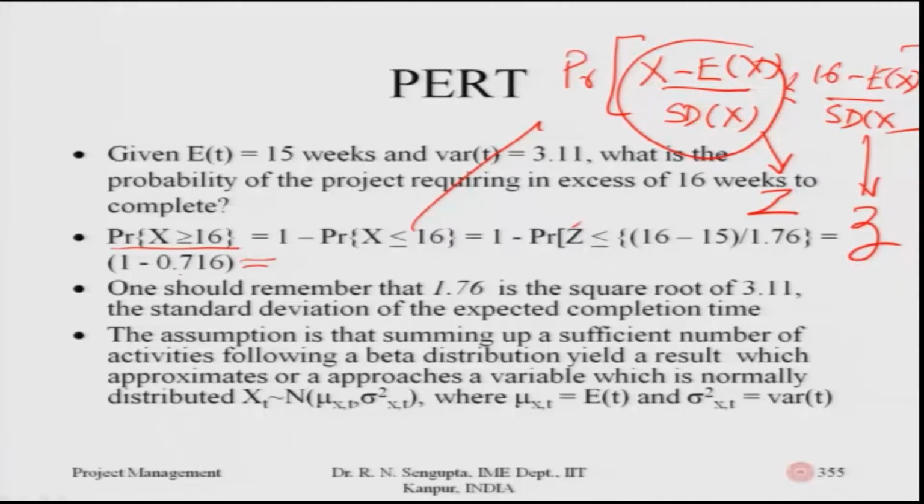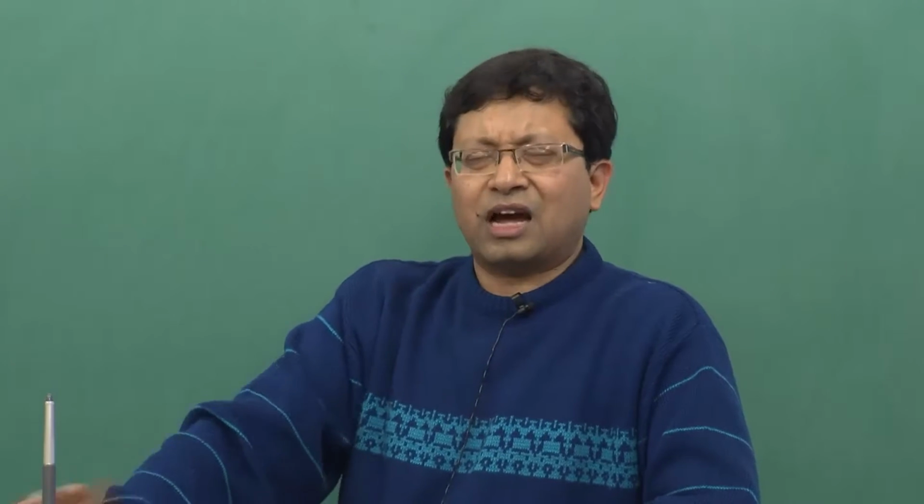If I want to find out the cost implication, you have to go through the contract and see what the overall cost value is that is being incurred. So, what is that 28% which I say? I am taking a value of 28% roughly. You will try to find out what activities are left and what the overall cost implication is. Are they very high value items, in the sense that those activities take a lot of time?